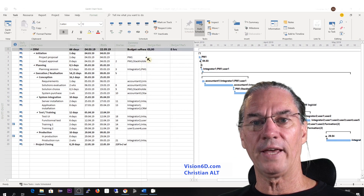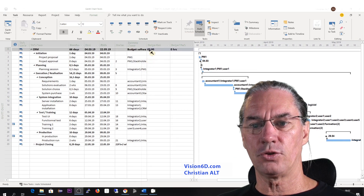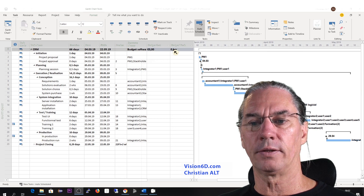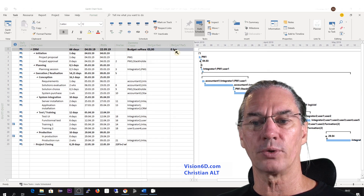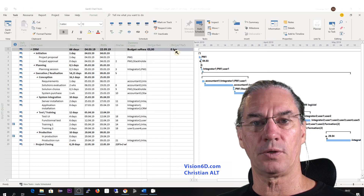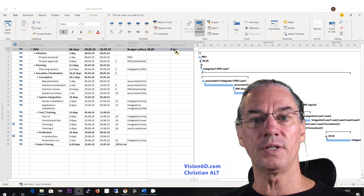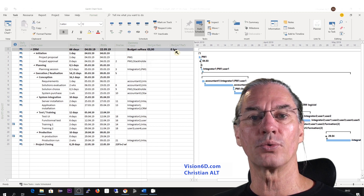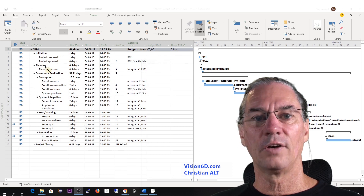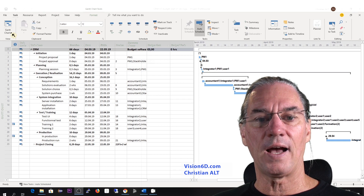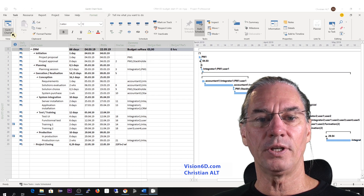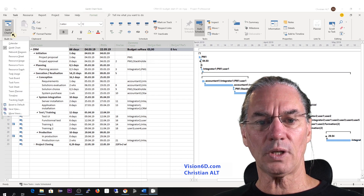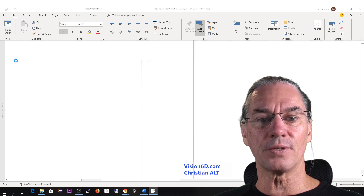On the Gantt chart, nothing changed. We still have a budget of zero and a budget of working hours still at zero. For this, we will need to give values to those resources. So I go here to select another view, which is the resource usage.